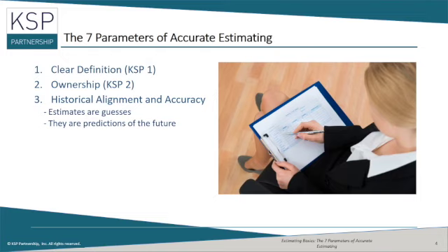While I'm not aware of any scientific comparisons of the 2 methods, generally in projects we tend to use historical information. The more accurate my historical information and the more aligned this task is to tasks I've done in the past, the more reliable my estimate will be. Also, the more frequently I've done the task, the more accurate my estimate.